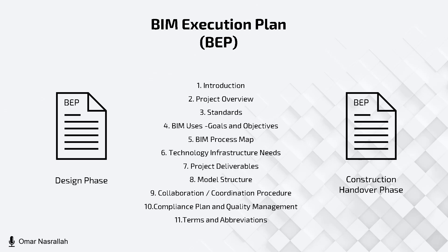I will highlight the important sections of the BEP, starting with project schedules, phases, milestones, BIM uses, goals and objectives, BIM process map, technology infrastructure needs, project deliverables, model structure, collaboration and coordination procedure, compliance plan and quality management, and terms and abbreviations in which we define the acronyms used in this project.